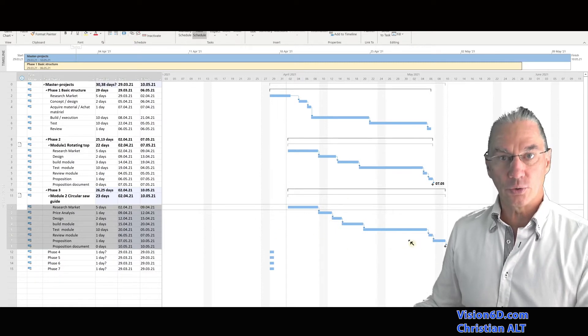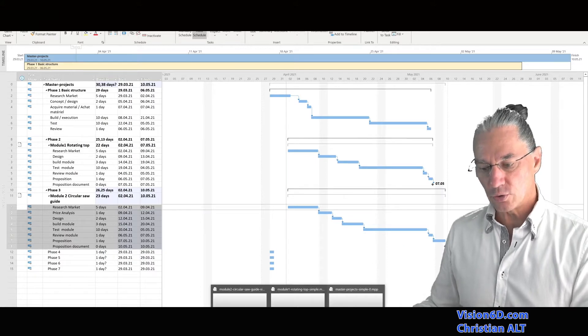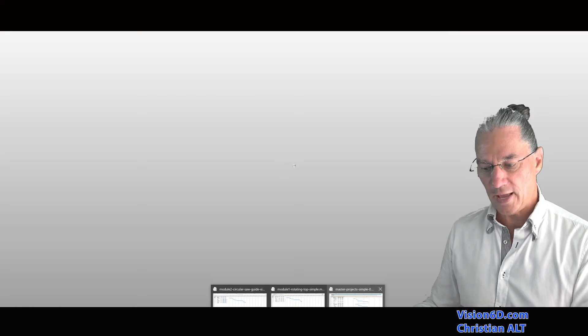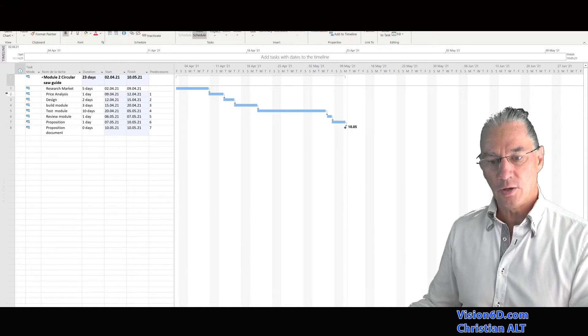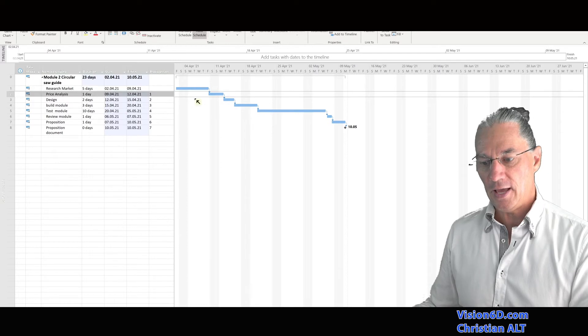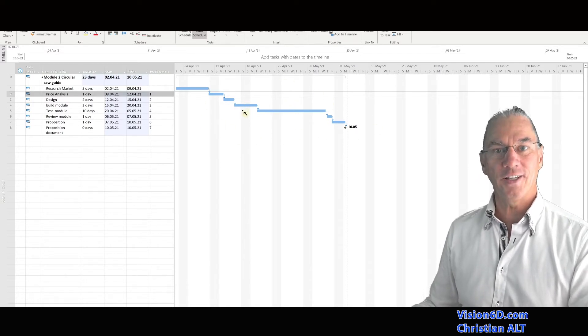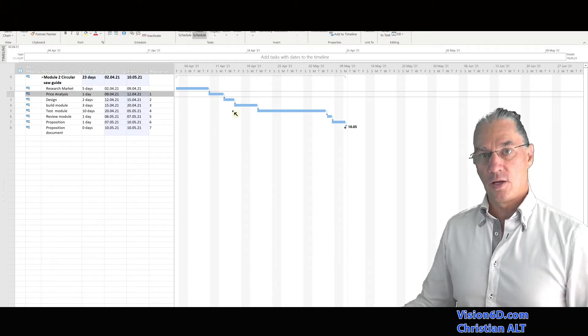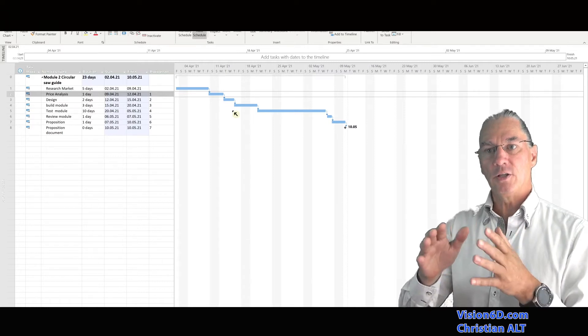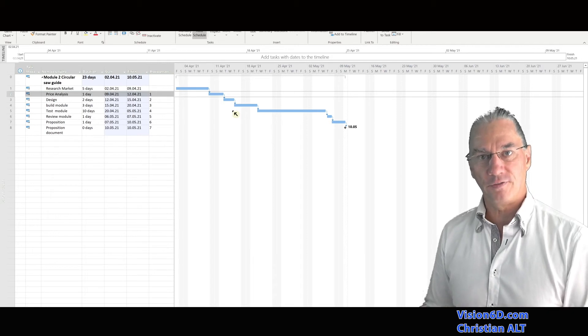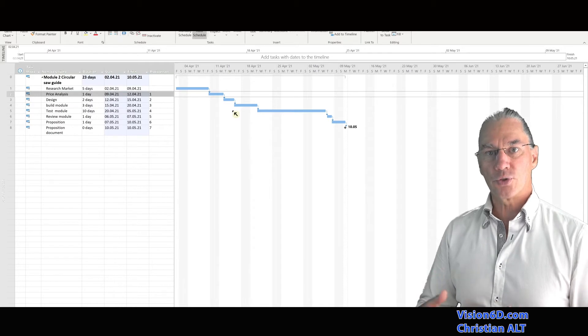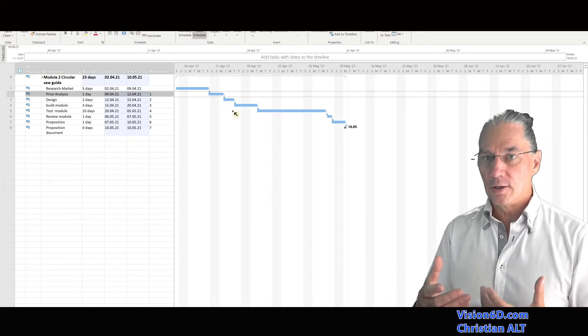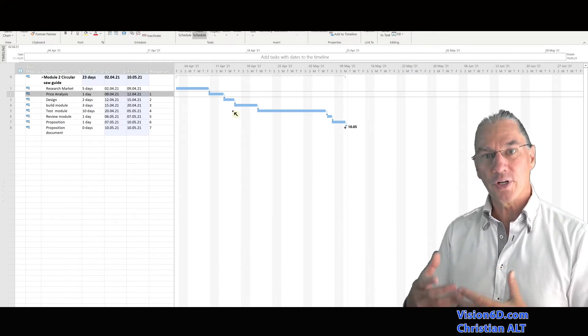So now we are going to switch to that module and look what happened in there. So if I'm taking module two here, we first see that we have a new task, which is price analysis here. And that our unlinking and relinking happened absolutely normally. So this means that what you do in the master file, you find it absolutely in the sub-project file. And why we could do this? It's because we chose to insert them in the read modifiable mode, and not only read only.